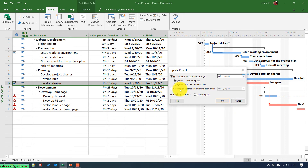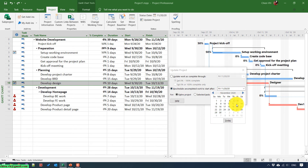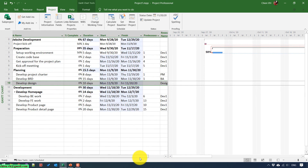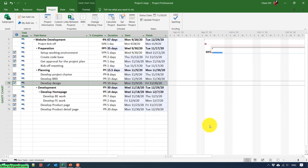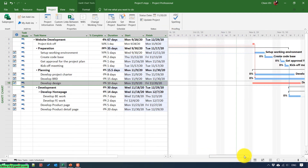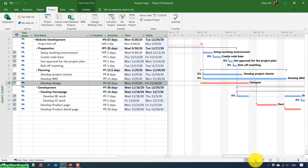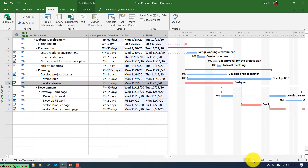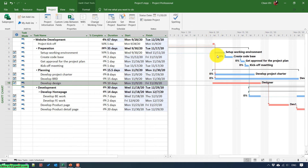Let me select option two with November 6th as the date and click OK. You can see that all of the tasks in our project plan have been given a new timeline. Taking a look at the Gantt chart, you can see it has already changed, and the green vertical line is now on the left side of all tasks. We now have a new project timeline.